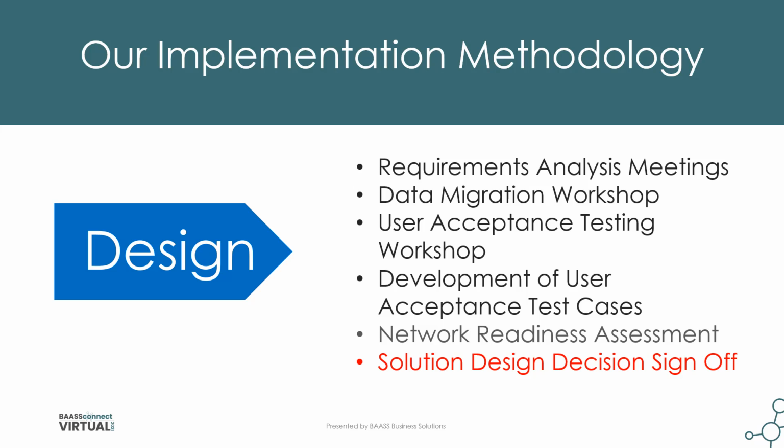In this session, we go through the master record imports, such as chart of accounts, customers, vendors, items. We also go through a user acceptance testing workshop. And within this testing workshop, it gives us an opportunity for your group to prepare for the test cases that will be used during the monitor phase of this project.